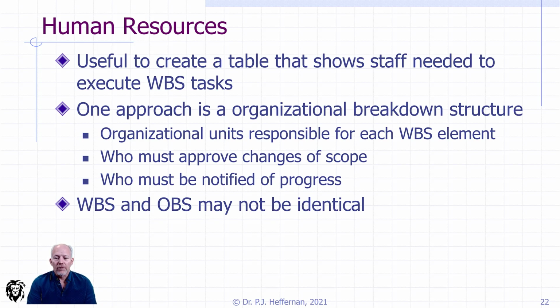So, a couple of other comments. I think we've exhausted work breakdown structure. It is useful to create a table that shows the staff needed to execute the work breakdown structure tasks. One approach is an organizational breakdown structure, where you have your organization and you assign the tasks to the organization or to the people. That should start to tell you who's going to be responsible for each of these tasks, who must approve any changes in the scope, and who must be notified of the progress of the individual tasks.